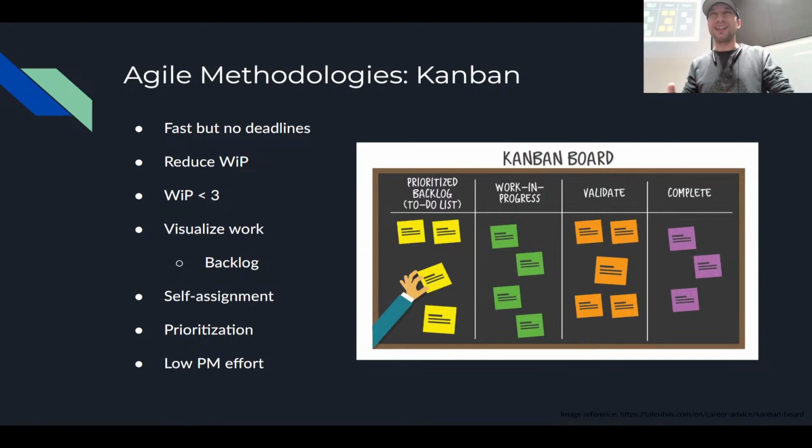Another key thing with Kanban is team members can pull on tasks as they're able to, right? So they don't have to wait for someone to assign the task for them. They just go to the board and say, oh, this is next on the list, in progress. I will go start work on this. Done, right? You don't have to have a whole big process. You don't have to have a whole bunch of meetings.